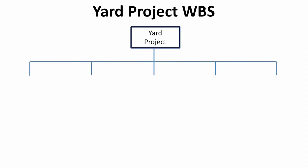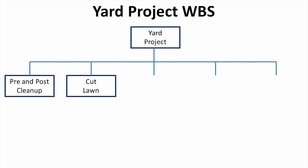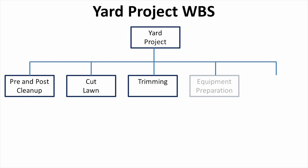Here on the screen you can see my work breakdown structure for my yard project. The tasks involved are pre and post cleanup, cutting the lawn, doing the trim work, getting the equipment prepared, and hedge trimming. Notice I didn't put these tasks in any kind of order — I just listed the tasks that need to be done, because sequencing is not the function of the work breakdown structure.